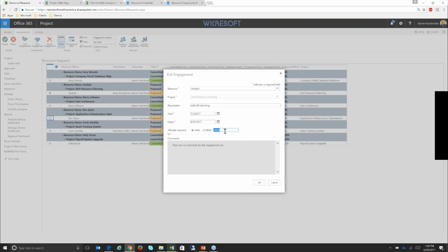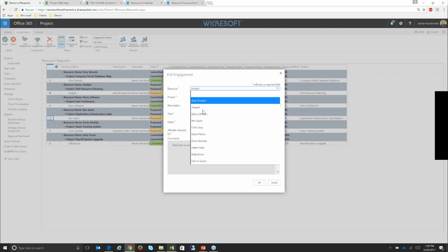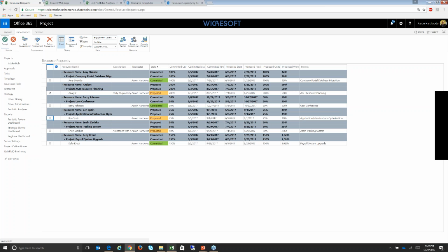So for instance, a PM might have requested 2 analysts, and I might say, well, I only have 1. So I could edit this and put some comments in here and say, I'm dropping this down to 100%. We only have 1 resource or 1 analyst available in that time period, so I could do that. Okay. The other thing I could do is perhaps replace the analyst with who I actually want to use. So maybe we'll use Chris Gray for that. Okay. And in either case, I can save that, and I can come back here and I can accept the engagement request.